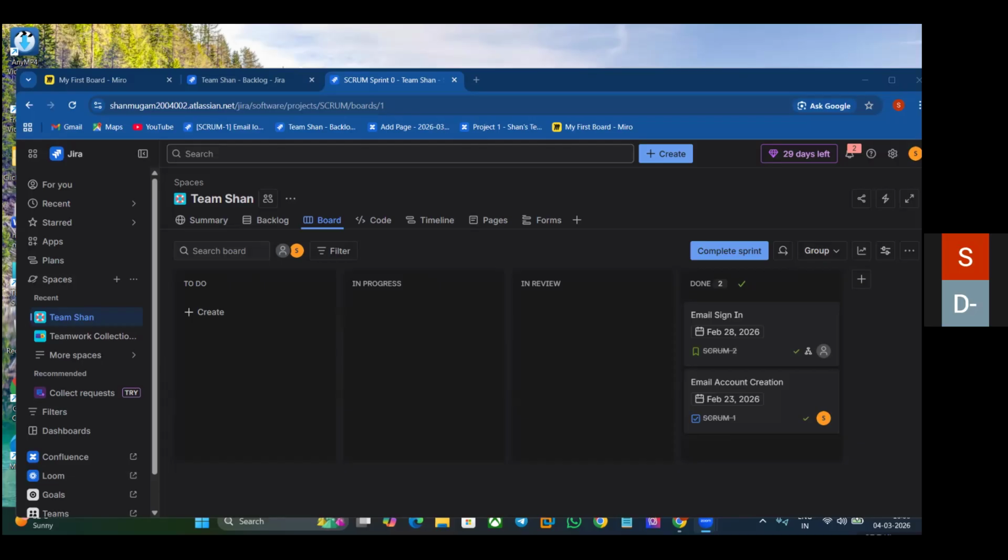But sometimes we have a dependency, let's say some other team has to implement a database or some other setup, installation, plugin or library. So we cannot do anything, right? We are blocked, so we are waiting. If we are not able to complete during that specific sprint, we carry over this task or user story into the next sprint.